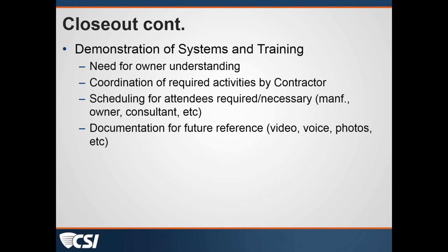This is my personal opinion, in the way I try to use the terms. "As-built drawings," and I usually put it in quotations, is the term I use for the set of documents that the contractor has in the field that he's marking up to show how he has actually built the work.